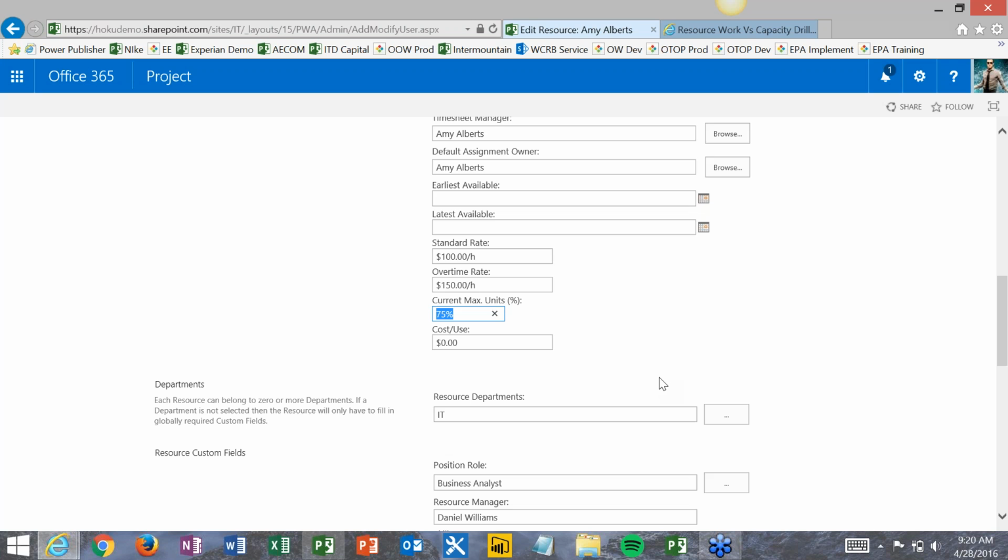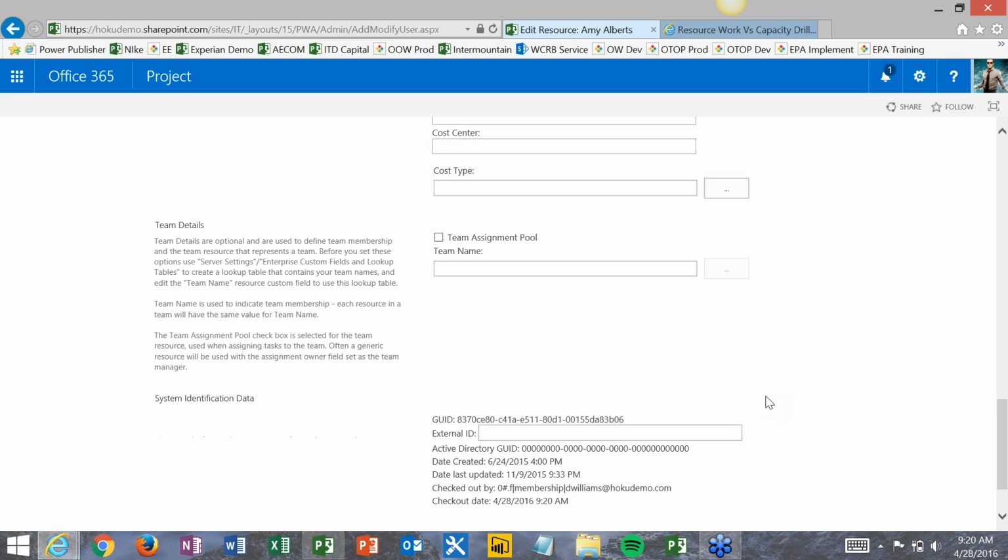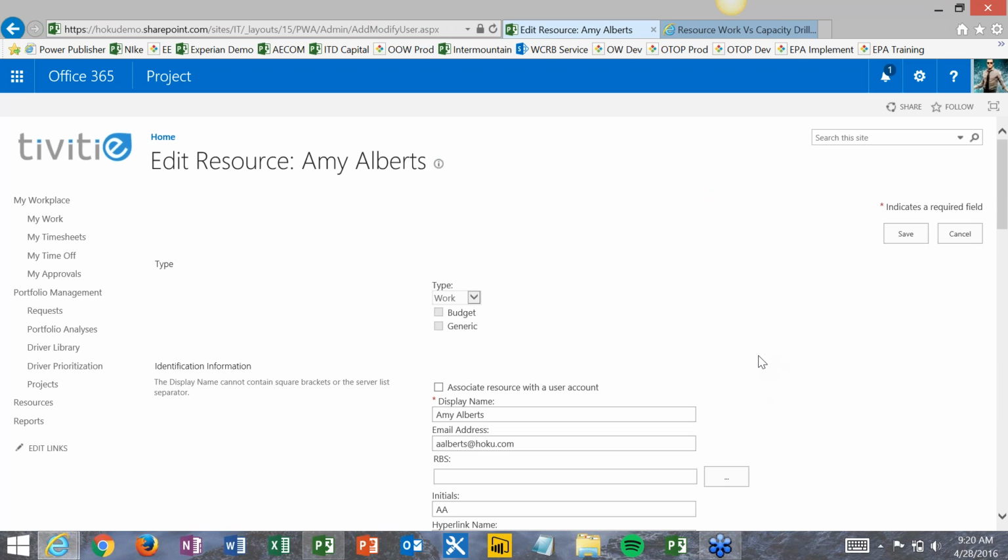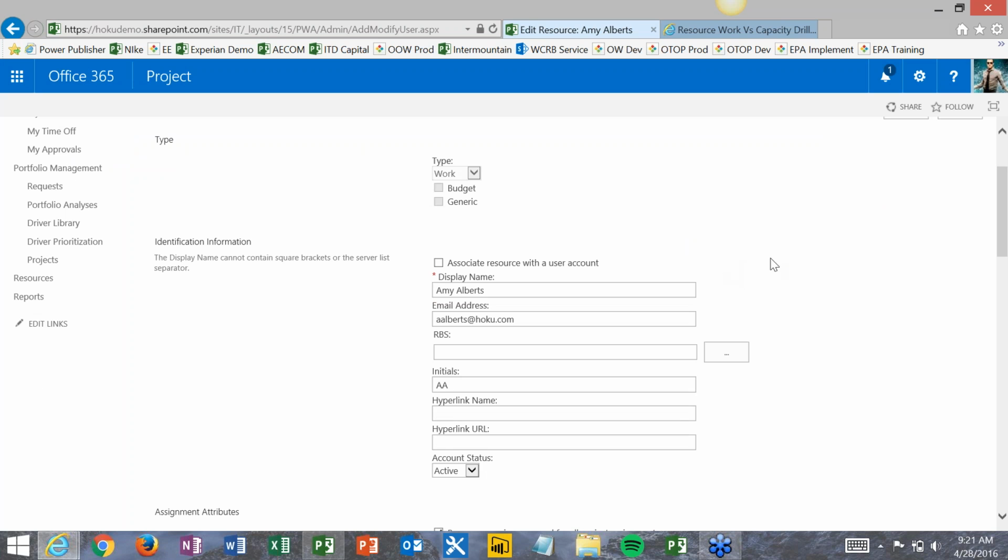What that's saying is, how much is this person available for project work? We can automatically, off the top, say 25% of the time is going to meetings and admin type of time and things like that. So basically when you set all this up, this is how we know how available a particular person is within a particular period of time. So when we're doing the resource planning and seeing who's available and such, it takes all that into account, as well as who requires a resource engagement, basically who requires the resource to be approved before we can use them on a particular project.